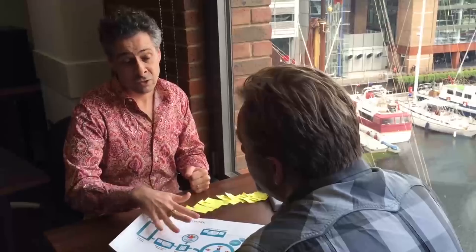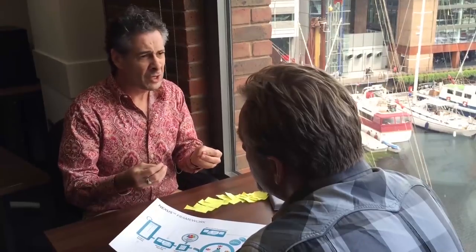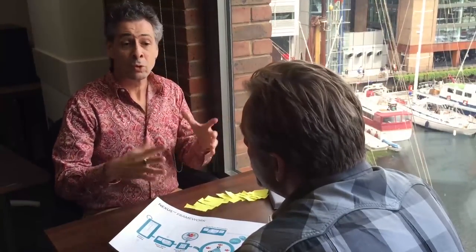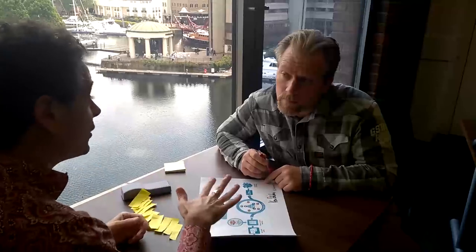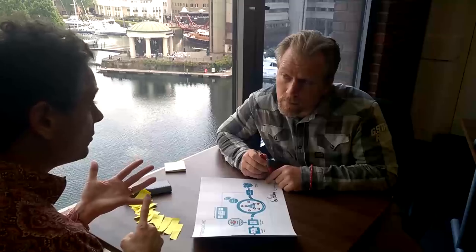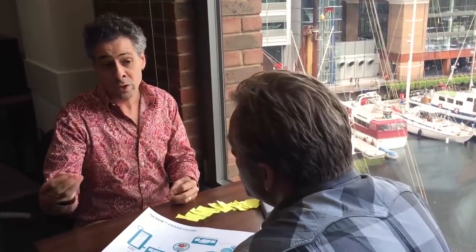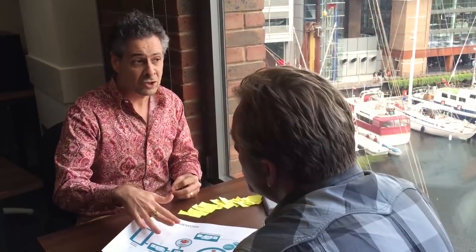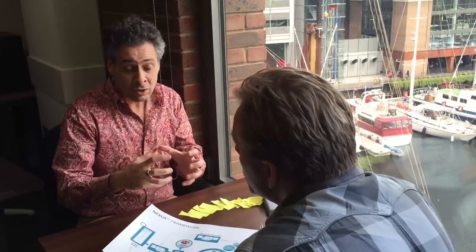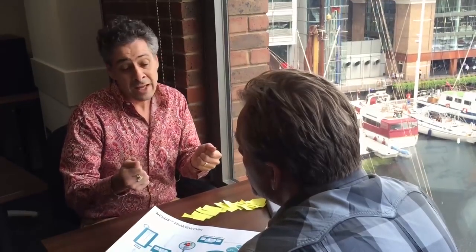And when I talk about successfully integrating, that obviously will be technically integrating, making sure the code works well together. But integration is about communication. It's about making sure the processes are being effective across multiple teams. So this team has the accountability. And how they facilitate that is they act as coaches, consultants, servant leaders to the individual teams, who at the end of the day are the people doing the work of integration. This Nexus integration team aren't doing the integration work themselves, because those are the individual teams' responsibilities, but they are facilitating it, they are supporting them, they are raising visibility and transparency. So that is their main purpose, and they are accountable.